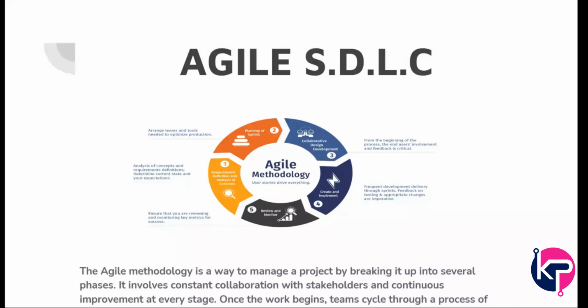That is the waterfall approach. You complete it stage by stage, and at last you deliver to the customer. The customer says, sorry, this is not my expectation, this is something different from what I expected. So you have to go back through the same waterfall approach, gather the requirements again, do the design again, and then do the implementation, coding and maintenance. In this approach the customer gets the product only after a year, two years or three years of project duration, which is a headache for the customer. So instead of that, we have the agile methodology.